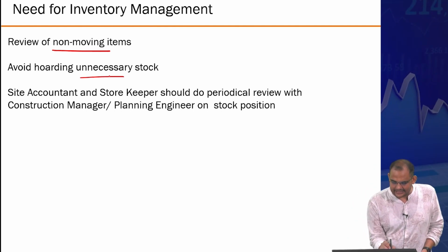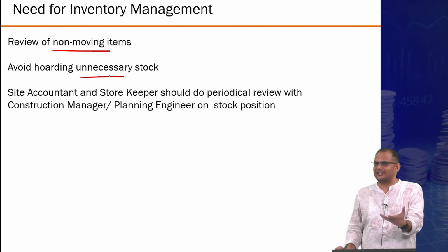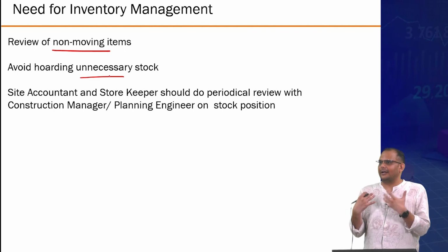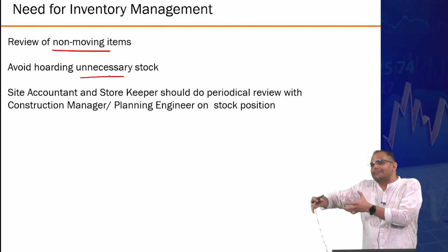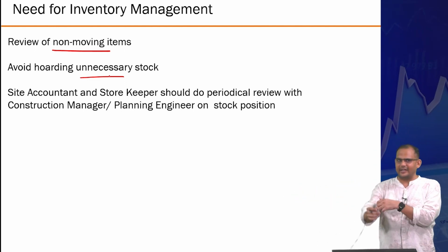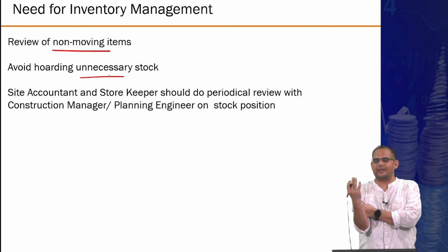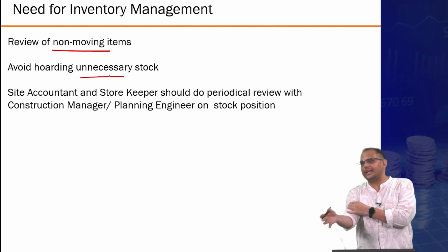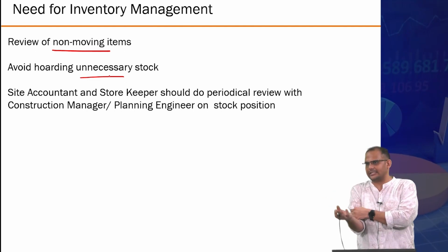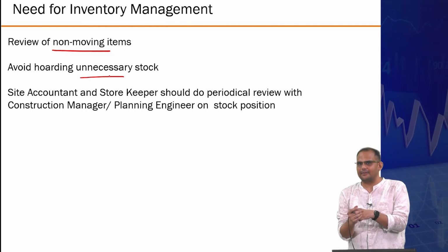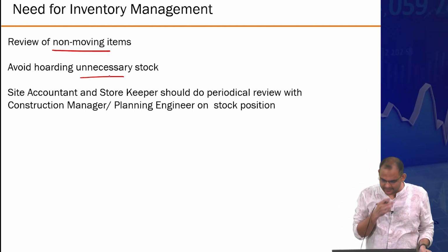Avoid hoarding unnecessary stock. This is very easy because the stock's cost is not immediately visible, right? You are not paying per minute of use of stock, but over the period it gets accumulated and starts reflecting in your balance sheet, and that's something which a lot of project managers do not realize immediately. It's not like every day you are paying so much money to rent a stock space, right? It's a space on your site which is fairly separate, but later you realize that there is so much cost associated with it, so that becomes the challenge.